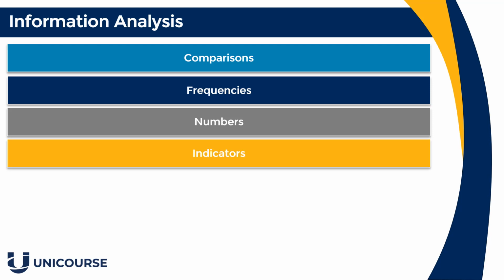Then we have indicators, so you can think of the indicators, for example, as the speed of a logged issue or its progress or the time it takes to resolve that issue. For example, the indicator you might have set was to resolve an issue within 48 hours, but was that realistic? You can then analyse that information and see maybe if that could be changed to 24 hours or maybe a week on the next project.